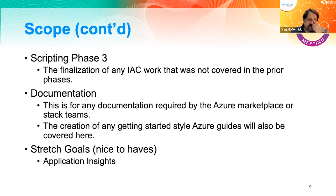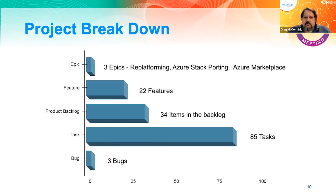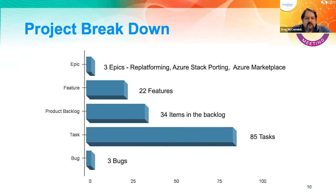Stretch goals include making it work with Application Insights. The team has been working on that and getting good metrics and tracking. For the project breakdown, we have three epics: re-platforming (largely done), Azure Stack porting, and Azure Marketplace. Out of that, 22 high-level features were created, with 34 items in the backlog and 85 tasks total. We only found three bugs within the system — there were plenty of things that needed refactoring, but really only three actual bugs.